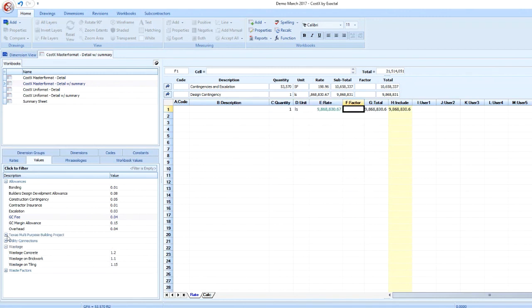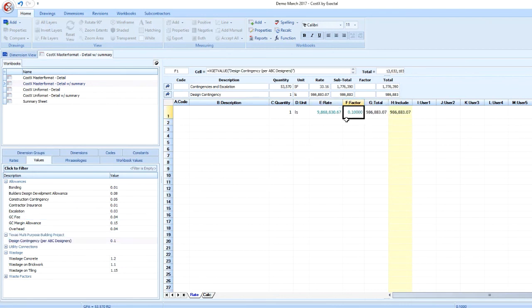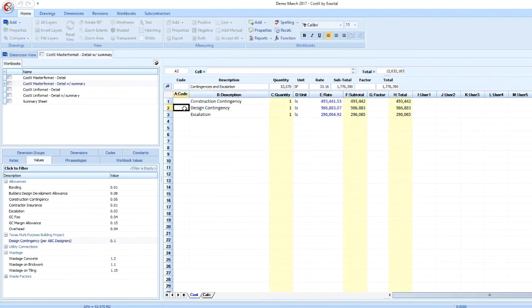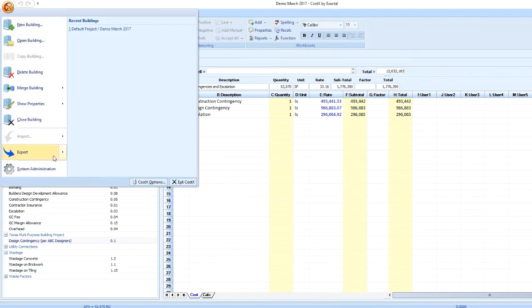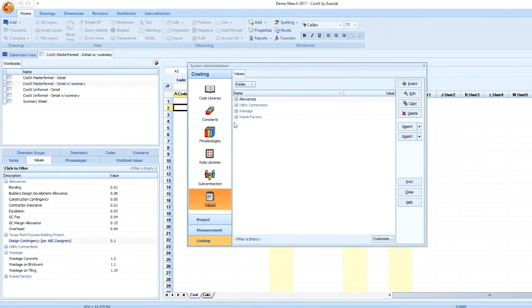The value will now show up in my Values window and be available for me to drag and drop into the workbook. Because that value was created in the Project Properties window, it will not be added to my standard set of values.